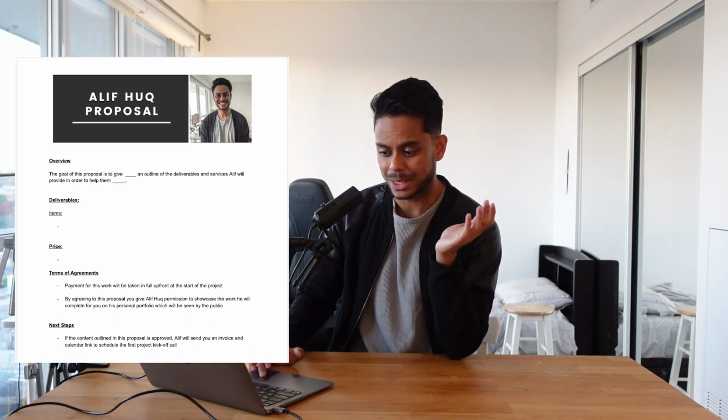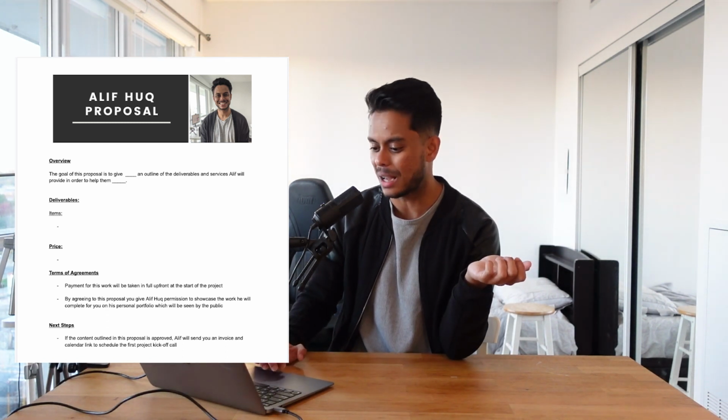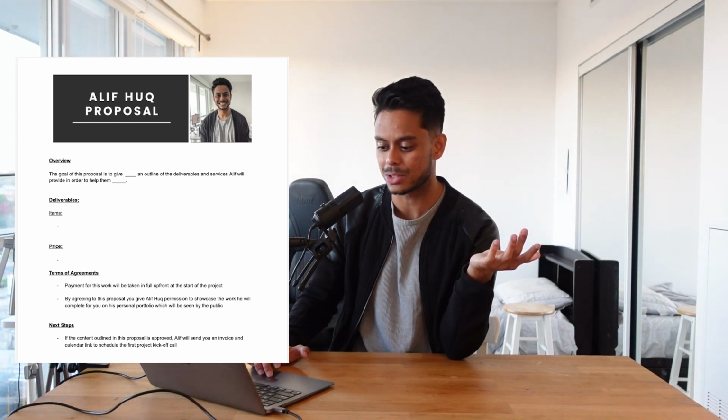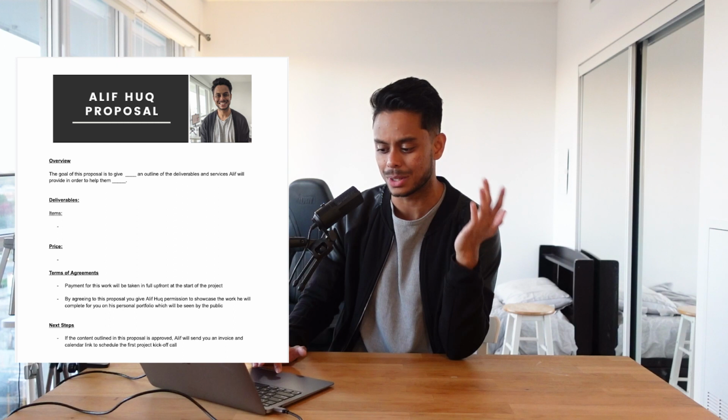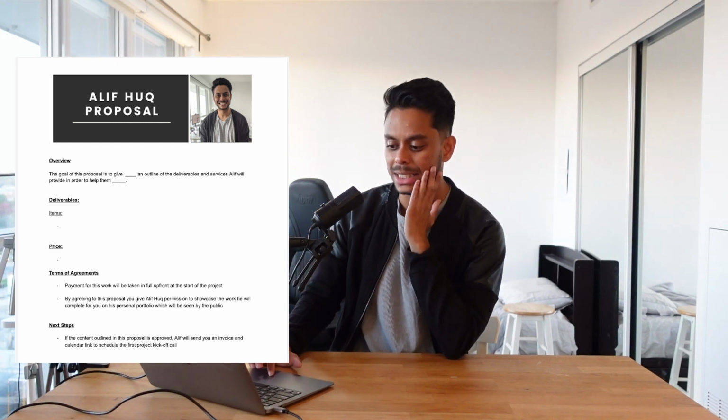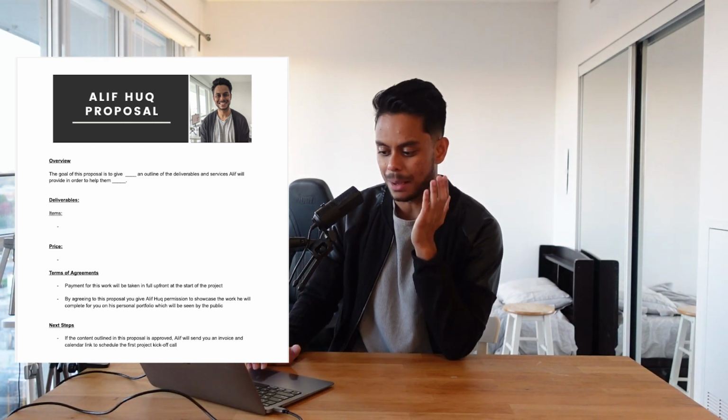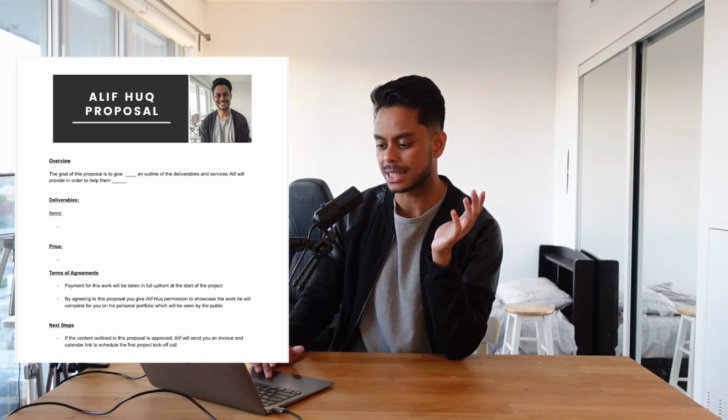All right, so I'll have my deliverables, then I'll write my price. Honestly, it's nothing fancy. I'll just write the price, 850 USD, 500 USD, 1.2K, whatever it may be, right? And underneath it, I have my terms of agreement. Payment for this work will be taken in full upfront at the start of the project. Again, we're trying to make sure the client is on the same page as us.